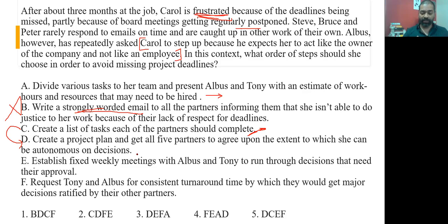If I am going to my boss and saying, hey, there are 3 things that need to be done. Of these 3 things, which ones can I do without even coming back to you? And if my boss says B and C you can do on your own, A, come back to me. So if the boss says A, come back to me, that means the boss is also indirectly agreeing, saying I will give you my time, or I am answerable to you, right? Because if the boss says, hey, A you can't do without telling me, and I am not available, then later if something gets delayed, I can always say, hey, you clearly said A was something that you wanted to talk about. So that's the subtext in D.